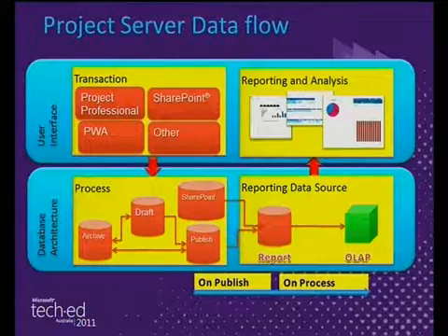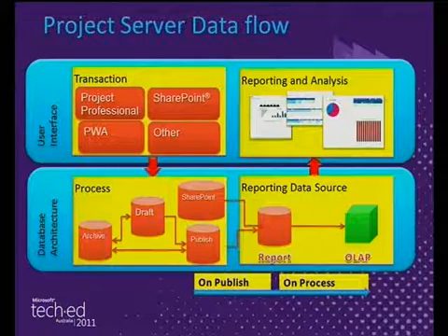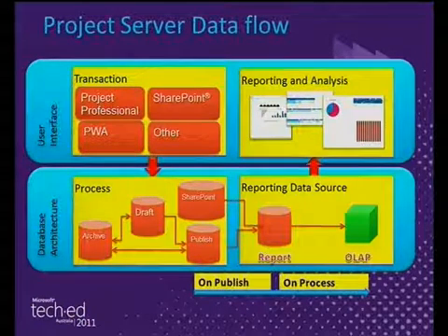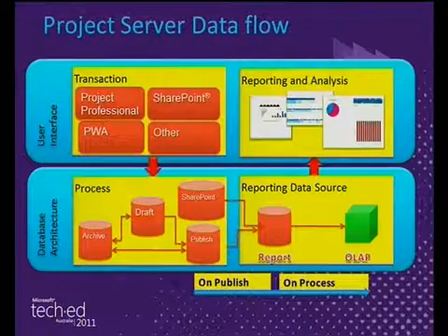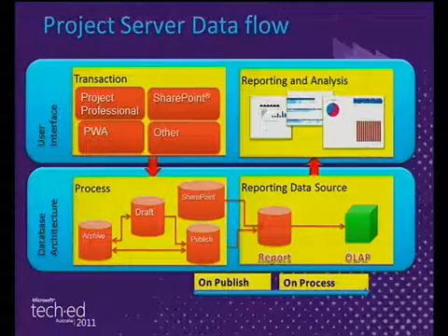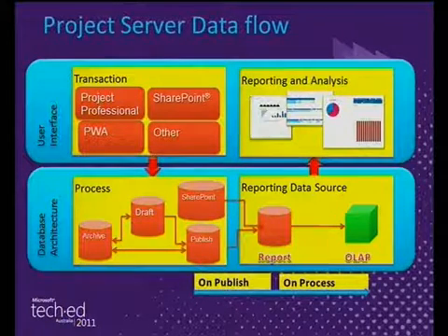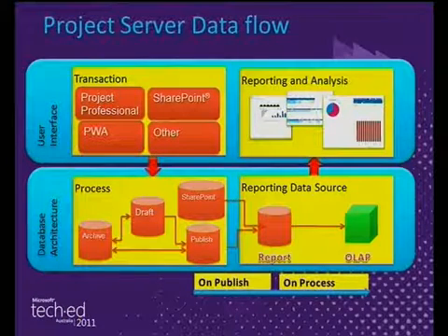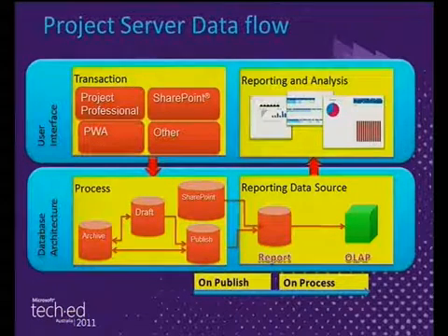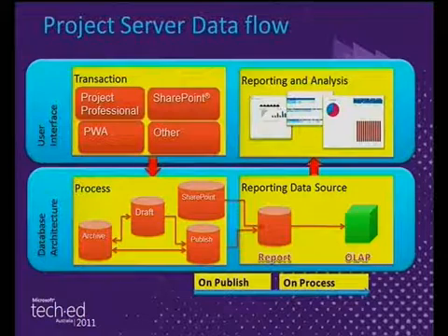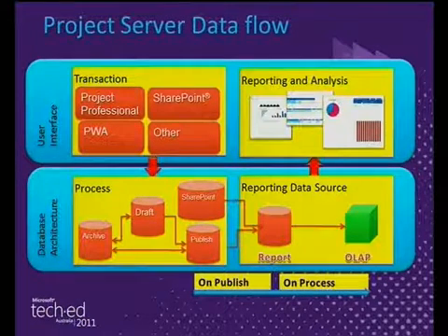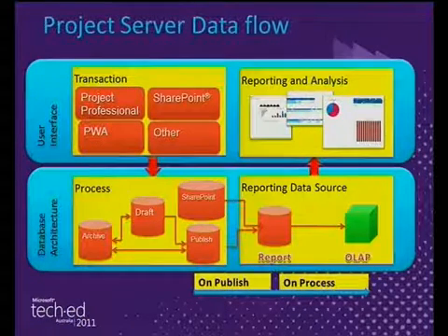Now, Project Server currently has 4 different databases, whereby only one of the databases is interesting for us from a reporting point of view. Once you publish the information into the Project Server environment, it will then automatically move the information into the relational database. And based on that relational database, Project Server is then also able to build these OLAP cubes.